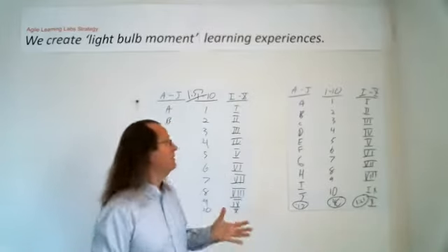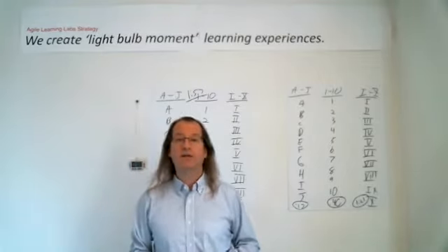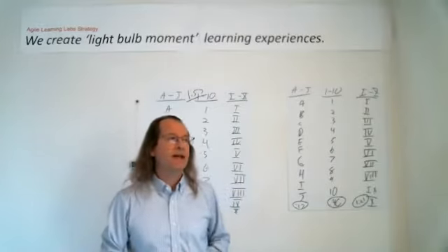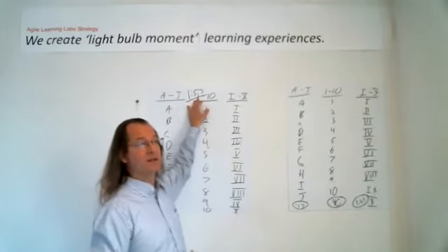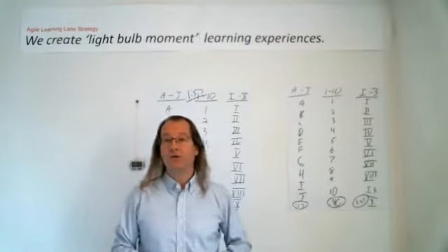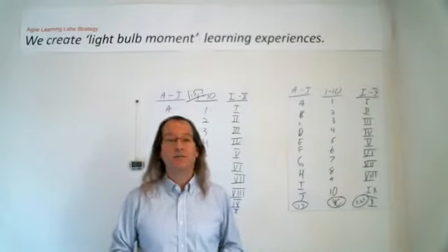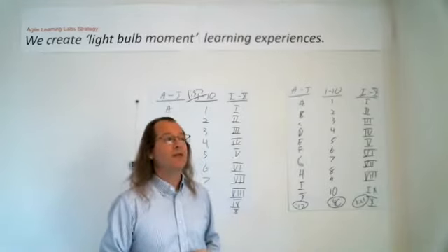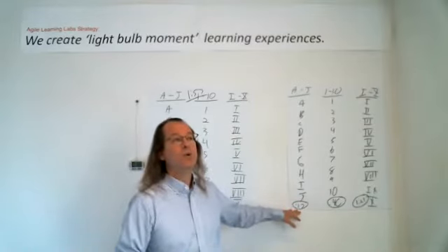So when we multitask, right, we have this context switching cost, and it turns out it's way more significant than most of us think. It's pretty expensive. And so the total amount of time and energy and work that happens is greater for the same output. Or put it another way, in the same amount of time, we can get more done if we're not multitasking.